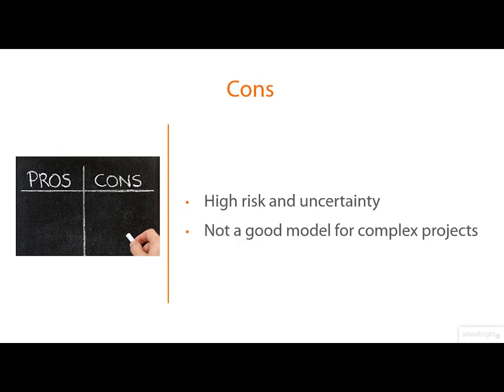We have talked about how the V-model is better for small projects, but it is possible to have a small but very complex project. The more complexity that is involved increases the risk of change being needed further down the line. Complexity in a system is also very hard to implement and test, and can often cause delays in the later stages of the V-model software development lifecycle.